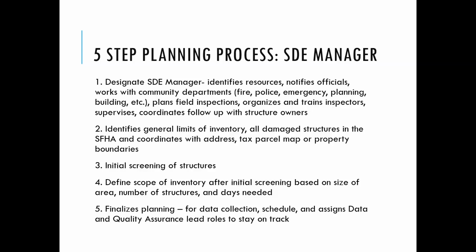establishing the scope, getting the tax parcel map and other tax data that you might need. Hopefully one department, if it's not the SDE manager, can do that overlay map so that you have the boundaries of your damaged areas and your floodplain, and then you would have the list of properties that are in the overlap. And then, as I said, the initial screening of structures, so you want to do a curbside review where you look at the structures and determine which ones are high, medium, or low damaged, and then go for the medium ones first.